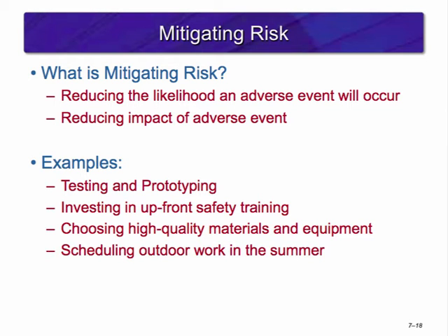Thus, the impact of the risk of code failing is significantly reduced. Other mitigating risk strategies include investing in upfront safety training, choosing high-quality materials and equipment, and scheduling outdoor work during the summer months.